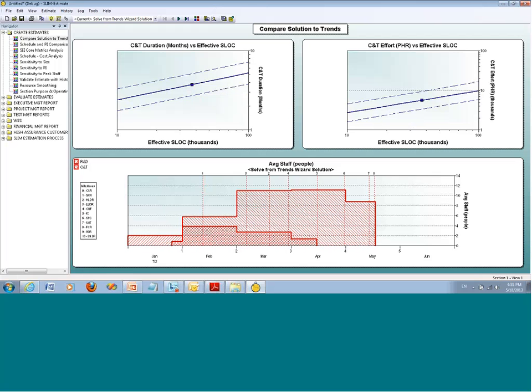The other thing that is new is it also used the phase tuning factors from this trend to set up the phase tuning for your project. And you can see here, it's got a long phase 2. Remember, that was about 93%. A fairly low effort in comparison to phase 3, and an enormous overlap.